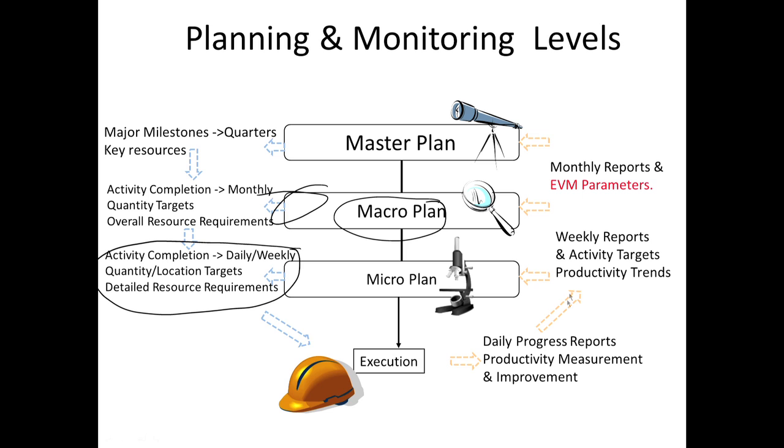This gives you data for micro planning; if any changes are required at the daily or weekly level, the micro plan is done and execution is adapted to it. Based on this, we also get the macro planning data coming, which provides feedback to update our network and do network analysis.